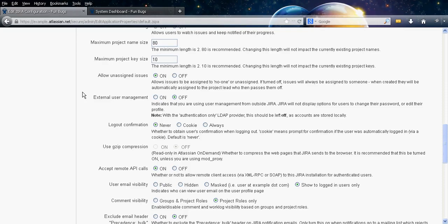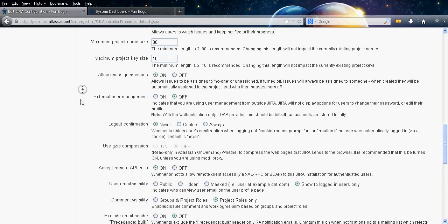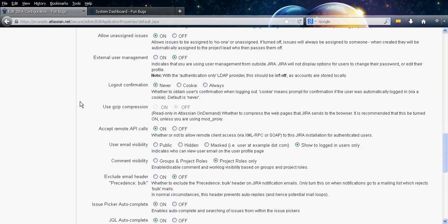The project key is used when you're searching for an issue. So if you create an issue in a project titled, let's say, GG for example, it would be GG dash issue number, so it could be GG-123. Okay, so it's important to keep the project key short, but also clear, so you avoid confusing multiple projects.